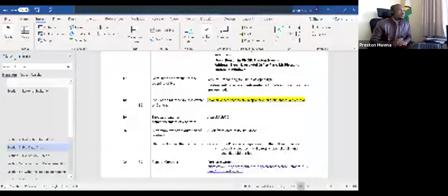Then the other one may quote me $6 a liter, but immediately available ex stock. In that case, we consider delivery, because this is an emergency. Remember, we are looking at these commodities as used for fighting COVID, which is a pandemic.